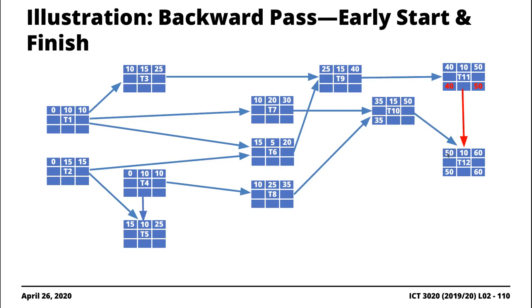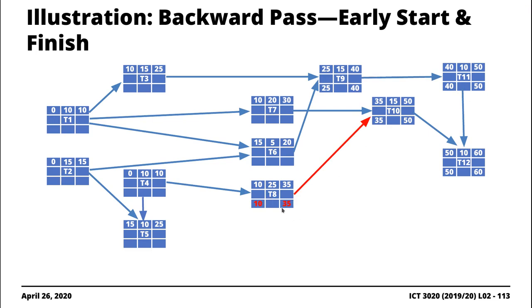For T10, we get late finish 50 and subtract 15 to get late start 35. For T9, we pull 40 and subtract 15. For T8, we pull 35 and subtract 25. For T7, we push 35 and subtract 20 to get 15. For T6, we put 25 and subtract 5 to get 20. For T5, since no task depends on it, we bring down 25 and subtract 10 to get late start 15.